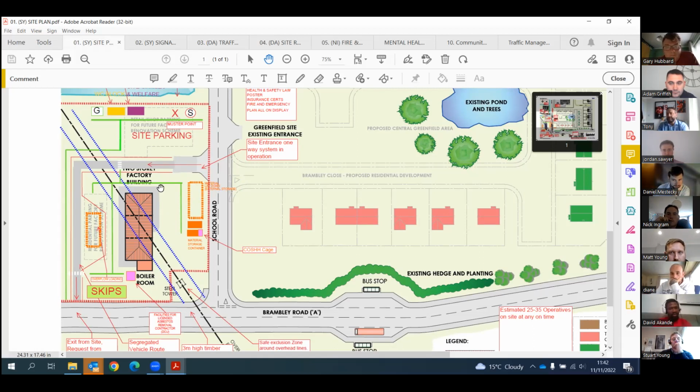And adding to that, while considering where the storage area will be, that was why we located it close to the main entrance, thereby reducing the distance by which the materials need to be moved. And in the case of supplies of goods or materials that could be reduced into parts, we could undo the manual handling aspect of that as well by breaking the material into bits, and that's one of the things we considered as well. Thank you.